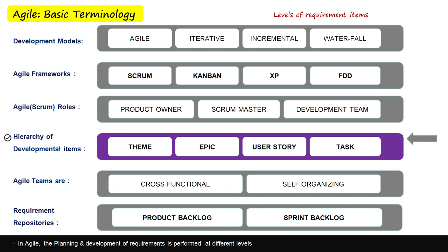And finally, the task. User stories are again broken into various categories of tasks to work on a day-to-day basis. Developing the user interface screens, designing, coding, preparing the test plan, and developing the database part are known as tasks, to name a few.